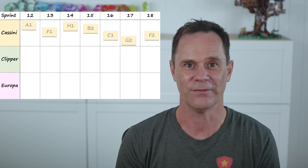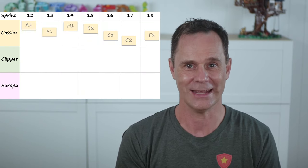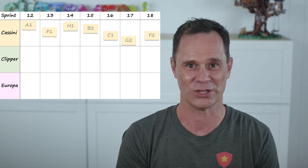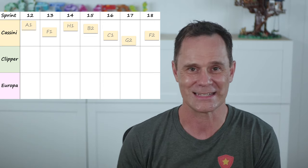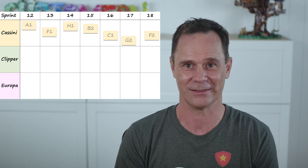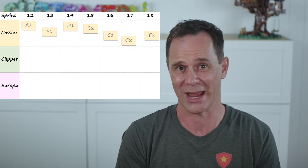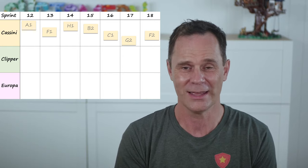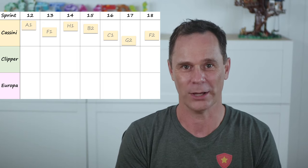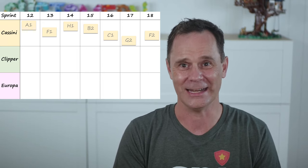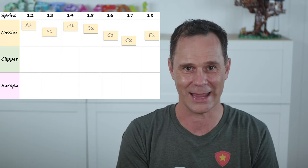Next, place the features that each team is going to build in the column representing the sprint in which it plans to finish the feature. I messed this up initially, thinking it's the sprint in which we plan to start working on the feature. But if you look at this example, knowing that Cassini is going to start on feature A1 in sprint 12, that doesn't tell Clipper or Europa anything about when A1 will be done. Cassini needs to forecast when they'll complete A1.